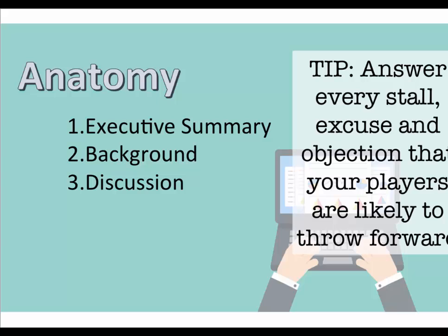Scope's important to think about because whatever you put in this document means that you're stuck with it for the rest of the project. So it's live by the sword, die by the sword. If you say you're going to deliver 4 and you get approval to roll out 4 programs, and then you secretly had every intention of rolling out 10, but of course the resources required are going to be 2.5 times and the implementation is going to be 2.5 times longer as well, then your project is going to fail and there's going to be a lot of people in the background going, why are we doing all of these extra projects? I thought we were just doing 4. So it's important to really think through what you're doing here.